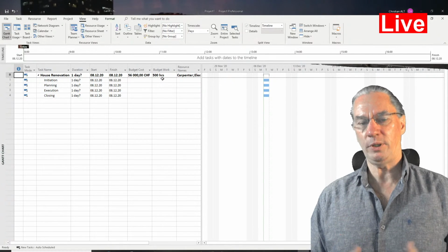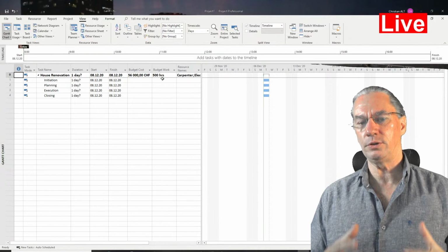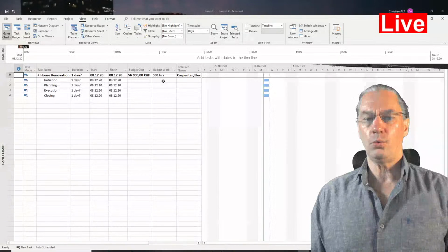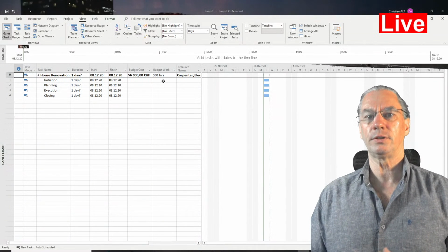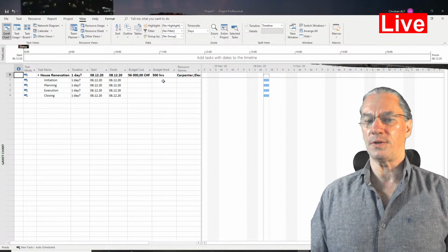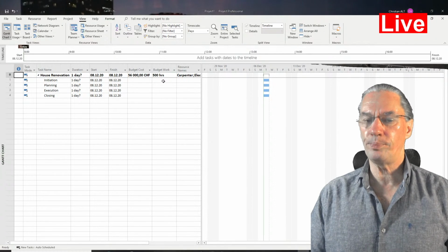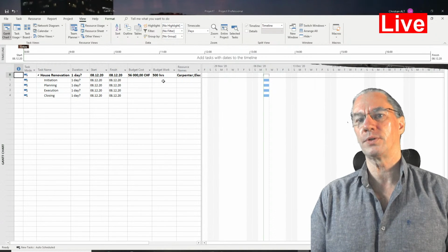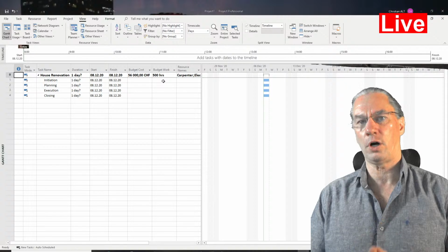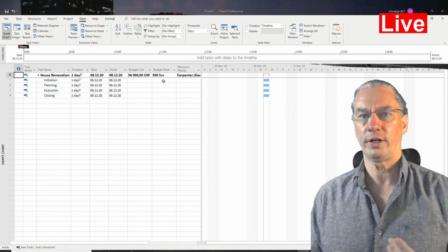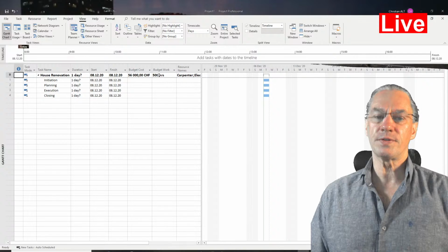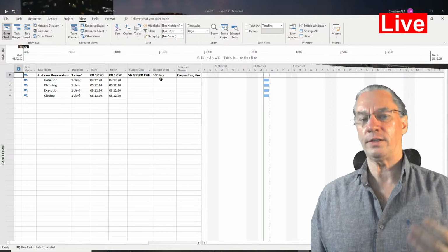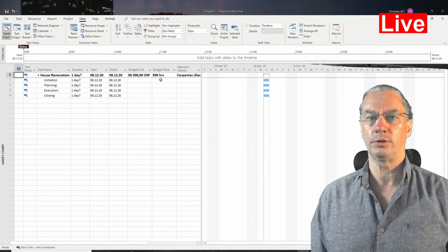You might have been in those situations where you need to buy equipment, but you are also yourself involved, where they like to convert it to money. That is to say, it's easier to compare two projects when you just have cost values and not a combination of cost plus internal work hours. And they define a certain rate per hour and they transform those 500 hours into an equivalent cost.